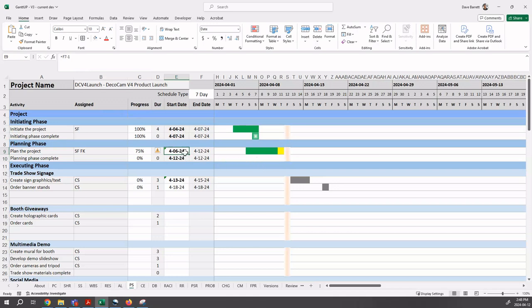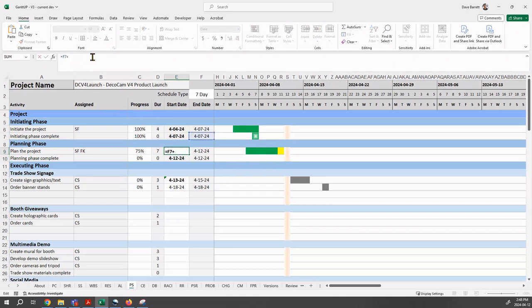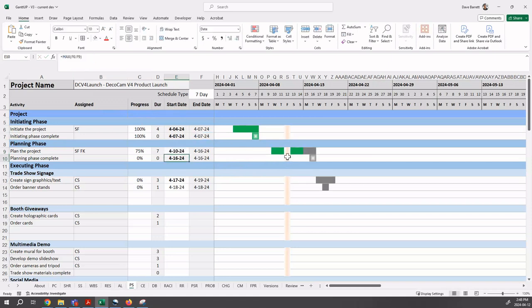You can also do a lag. For example, you can say instead of plus one, we could say plus three. And we see now we have a lag show up there. So there's various flexibility that you can do in this case. So that is with a seven day schedule.